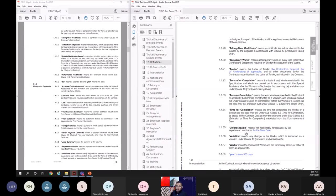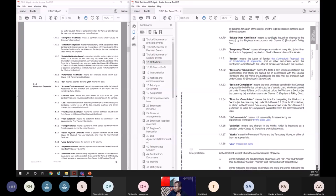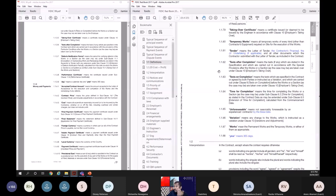Now, FIDIC 2017 tries to pinpoint it to the base date so that it's very clear. Base date is 28 days prior to the tender closing date. Year has been defined as 365 days. As I remember, there were around 58 or 59 definitions before. Now it's 89, as I remember. So 30 new definitions have been introduced.